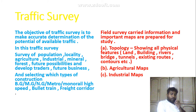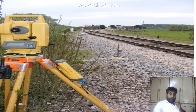Field surveys are carried out and important maps are prepared for study. First is the topology map, showing all physical features such as land, buildings, rivers, bridges, tunnels, existing routes, and contours. Second is the agricultural map, and third is the industrial map.